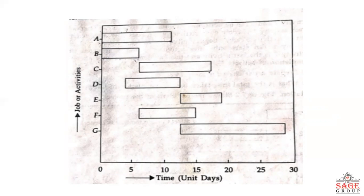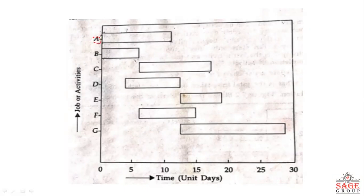In this area, each task and activity is shown. You can see how many days each activity takes. For example, activity A takes 10 days. Simultaneously, we can start B activity along with A. C activity starts only after B work is completed.